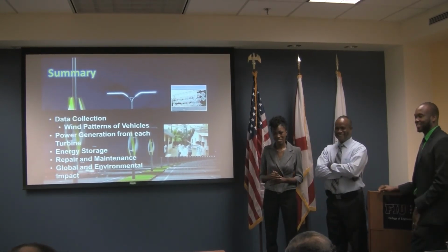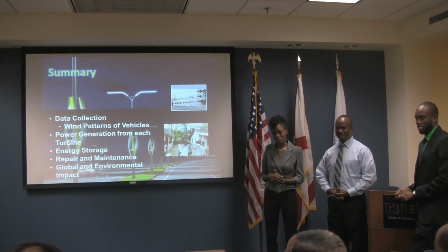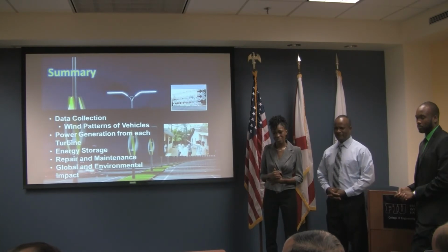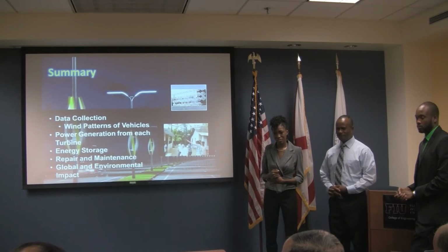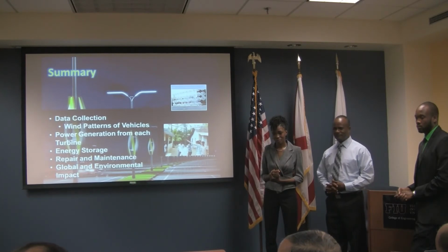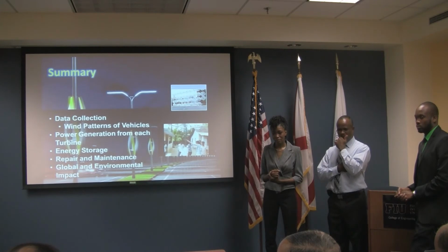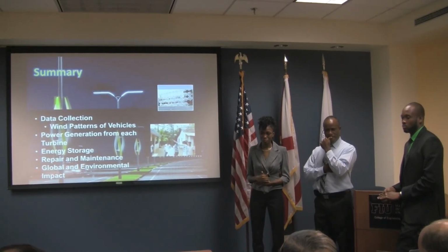But anyway, I look at your project plan and the simulation time seems pretty short. Definitely your testing time seems really short. You mean it's like a week? I would propose that you work on this in such a fashion that you get your prototype done earlier, use your summer to your opportunity, and get some more simulation time.